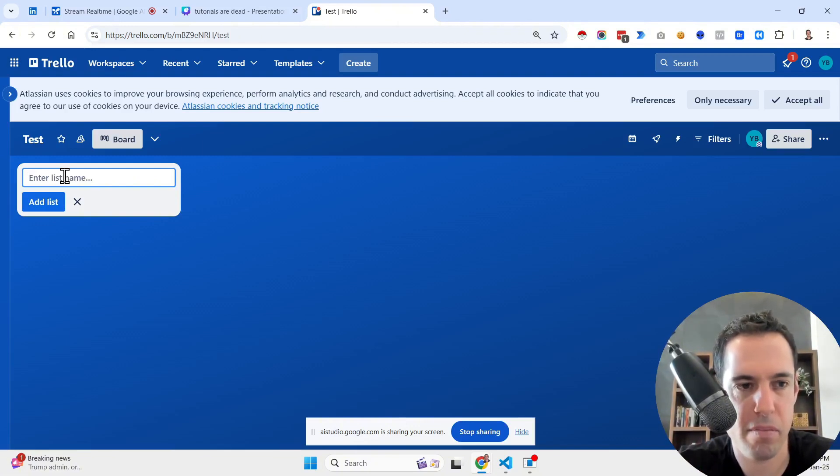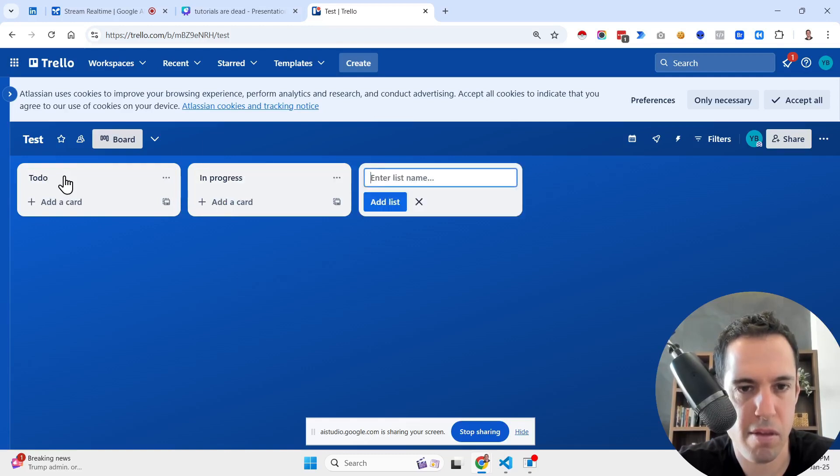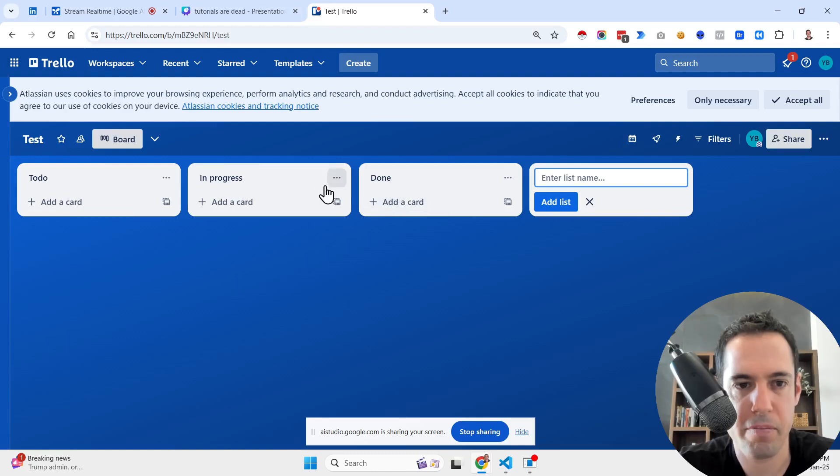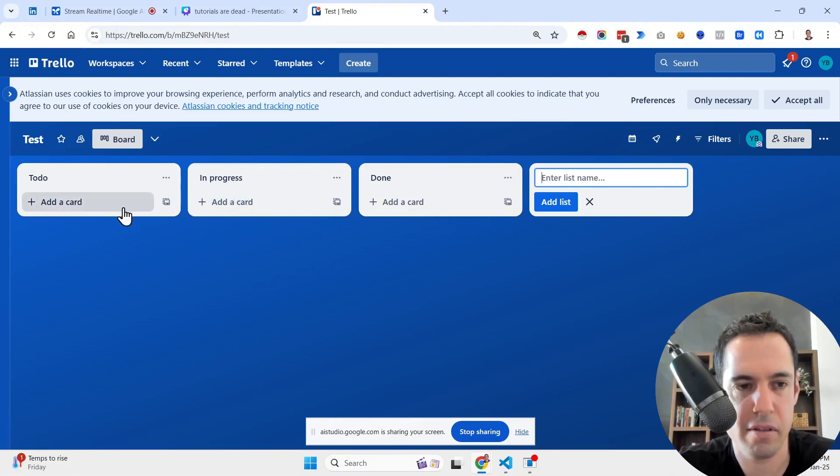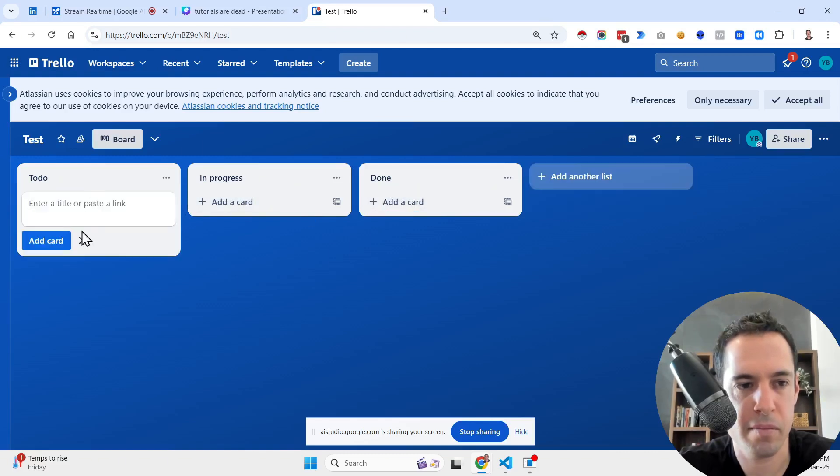Okay, to create a Kanban board, you should start with a list of to-do items, then another of in progress items, and a final list for done items. You can name your first list to do. After typing in the name, click on the add list button. Correct now. Yes, it looks like you've created the three lists needed to create a basic Kanban board: to do, in progress, and done. Now you can start adding cards to your lists.